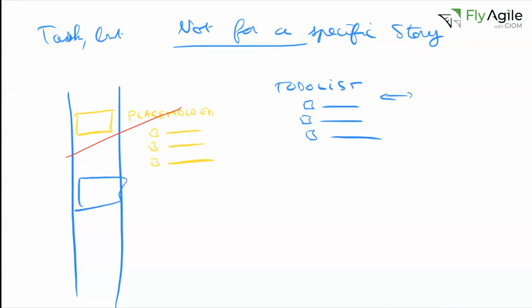I do something that I will call the first user story. Exceptionally, I know that this is a first attempt. On one web app, I literally saw we were going to do a white page, but in the acceptance criteria, with the definition we have, just to have a white page, we need to have Git. So in the checklist, we have install Git, get licenses, because not everybody had this. Basically, I got the tasks attached to that user story. And to me, that's my best recommendation.